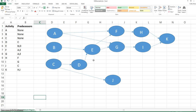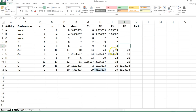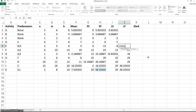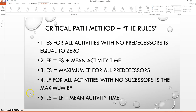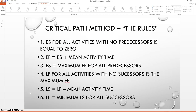Activity E is different — it has two successors, F and G. The latest these two activities can start and still have the project complete in 36.33 days are 13 and 15.83, respectively. Because E has to finish for both F and G to start, E will have to finish by the smaller of these two late start times to keep the project on schedule. This is the sixth rule: the late finish is equal to the minimum late start time for all successors.